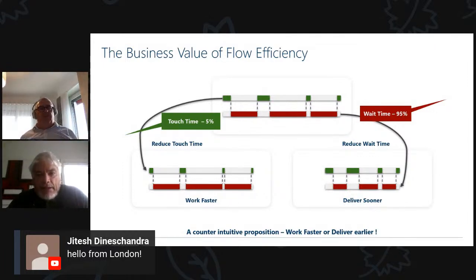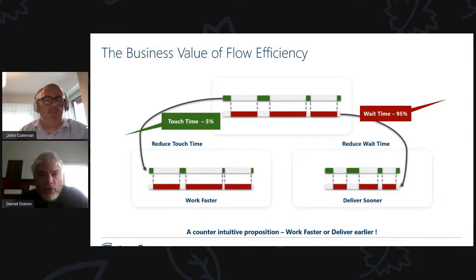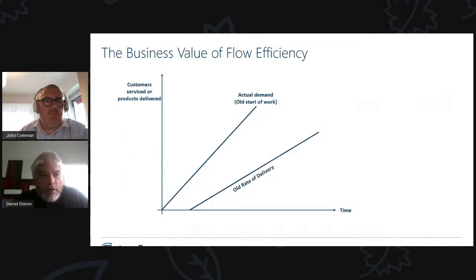I think I prefer to reduce wait time, though. I mean, isn't that what we all want? Yeah, but look at the trick here. You've got a choice. You either reduce touch time or you reduce wait time. You either work faster by improving touch time, or you deliver sooner. You reduce wait time, and you basically don't change the way you work.